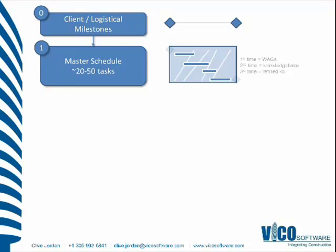Then we look at the master schedule, and we hope it's driven by our knowledge base and is production-based, so we can spot bottleneck trades and eliminate areas of concern. We can staff certain subcontractors in ways that allow us to achieve the plan and isolate risky areas before more detailed planning. We're using a knowledge base refined from previous projects, which is a much better starting point than high-level assumptions.